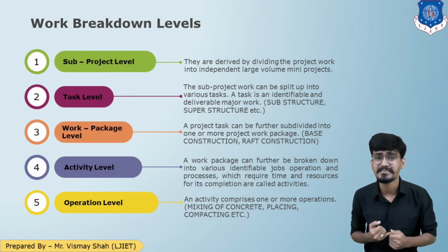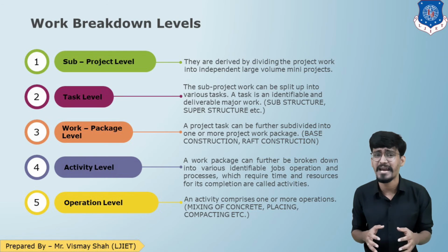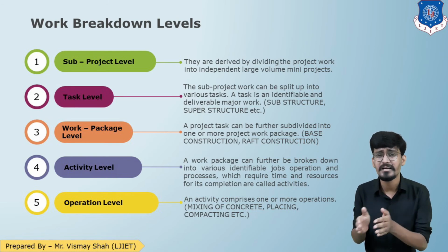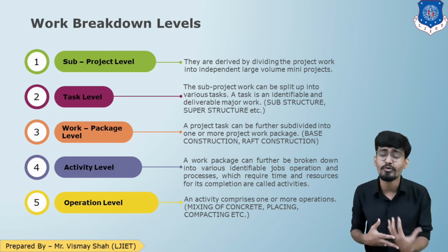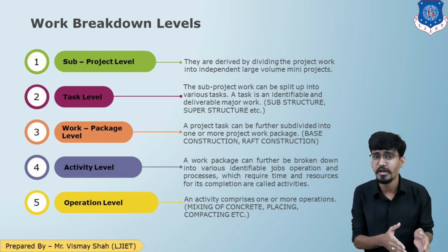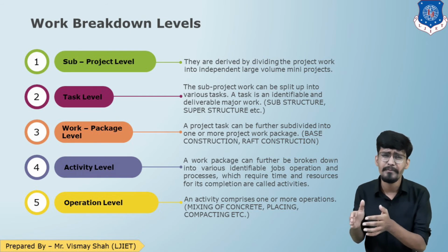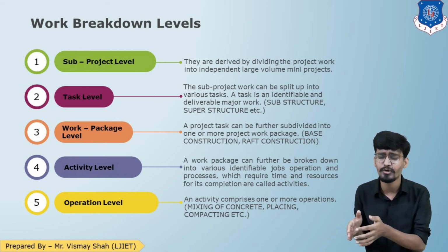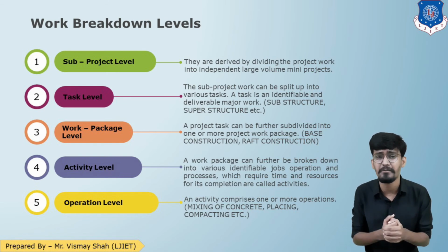The first is sub-project level. They are derived by dividing the entire project, a large project, into certain mini projects. For example, if you are planning a township, then the construction of residential buildings, commercial buildings, or a hospital in the township. So you are dividing the entire project into separate mini projects. That is the sub project level.